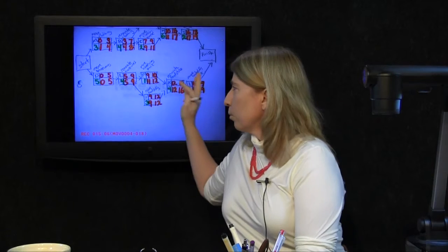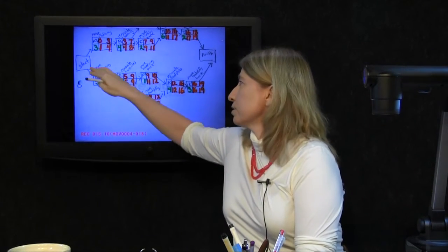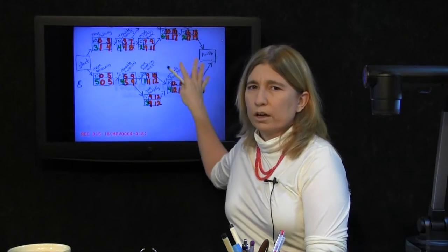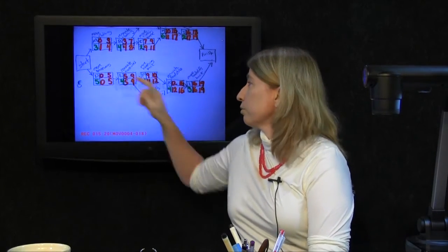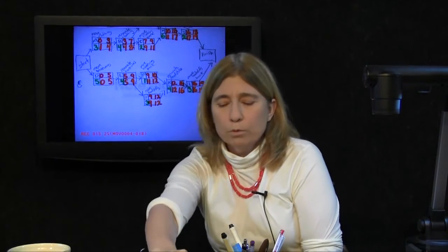0. And I'm really glad to see that, because by the time I work my way all the way back, at least one of the activities that's attached to the starting node, the late start time needs to be 0. Because if that's not true, then I must have messed up some arithmetic elsewhere on my way towards the starting node. Okay, but no, D, 0. Good, good, good. Now, what was the question?